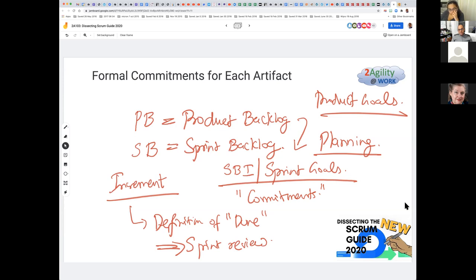In that case the product goals are the product objectives, and then we break it down into smaller goals: in the next 2 weeks or 3 weeks, our goal in the context of the larger goal is to do these sprint backlog items, which we took from the product backlog. The theme of the sprint goal is that these items constitute a portion of the product goal.